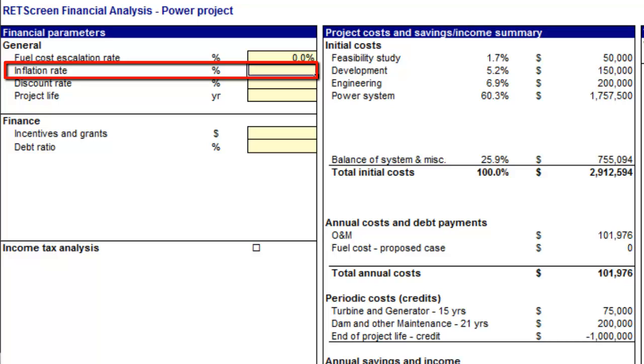Canada could also focus on exporting its resources and trigger deflationary policies to support its natural resources. It is important to understand that if a significant portion of a project's cost during the operation relates to some equipment imported from another country, then we would have to prorate the inflation with the inflation of that country. In our case, less than 2% of the costs are estimated for the turbine and generator replacement. So even if these parts were imported, about 98% of the project would be domestic and therefore would be affected by the Canadian inflation rate.